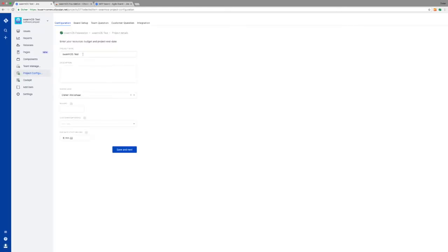So we have created our project name. I have set myself as the product owner or project lead. I can give it a budget, which will be important later on. I can set a customer if I want, and I can give it a project end date. Let's assume it's the 30th of April 2018, which is something I want to achieve. Second, as I've chosen a software project, I work in Scrum.